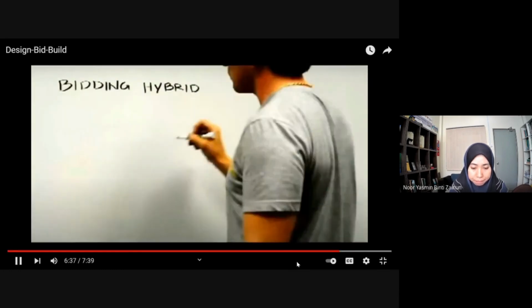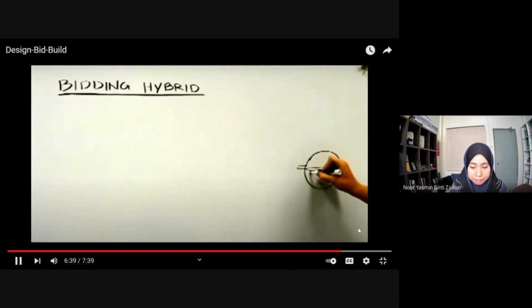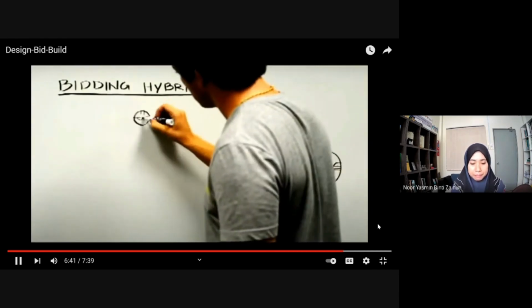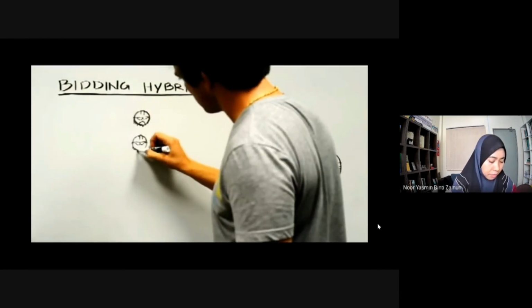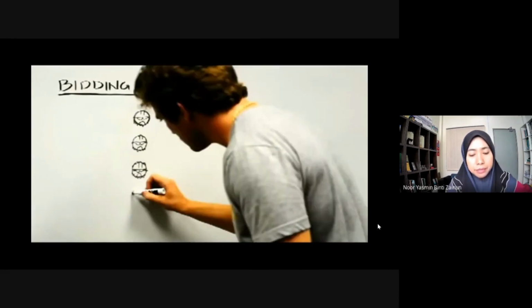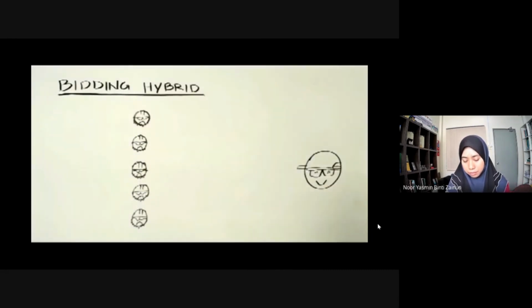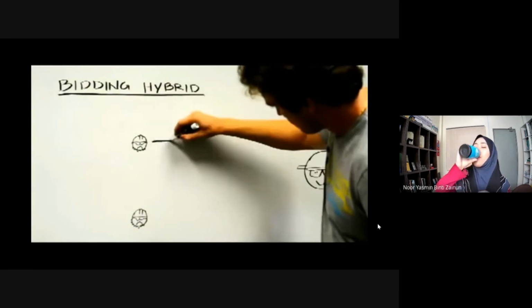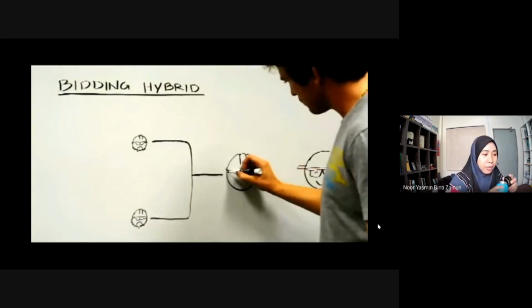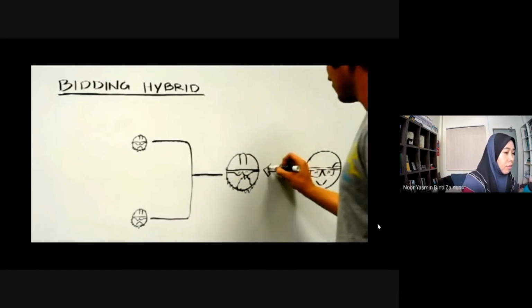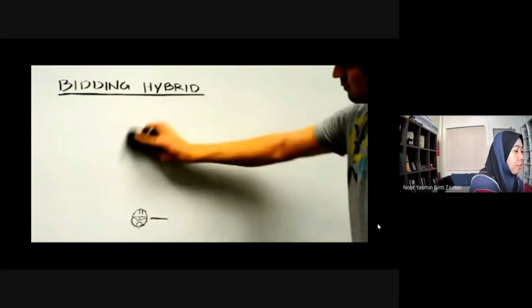There are some variations in the execution of the traditional project delivery method. One such deviation is a different bidding process. In this hybrid, the owner obtains bids from only a few pre-selected general contractors based on qualification, expertise, or previous experience. After bidding proposals are submitted back to the owner, the contract is awarded to one builder, which leads to the building process described earlier.